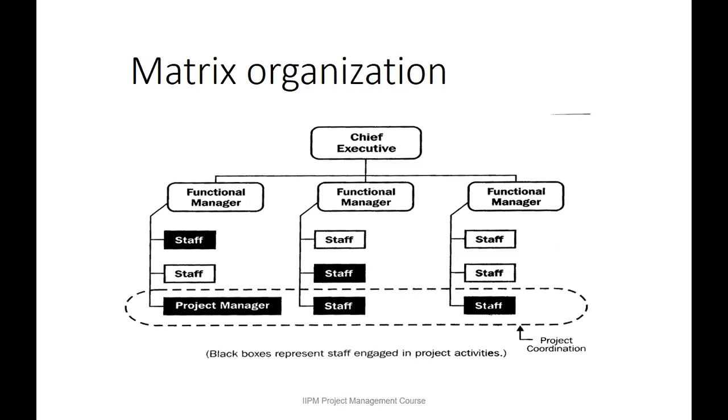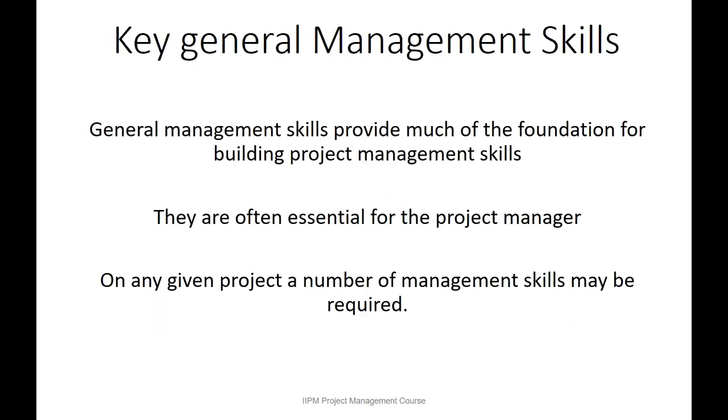So there is a 50-50 balance and check approach. Then you have the other one that we call the directive, where the functional management or the project management office are absolutely responsible for managing the project, and then the authority level of the project manager in that case becomes low. So in that case, we can make it equivalent to the functional structure or functional organization. So we've repeated these things over and over again, and I believe I can proceed from here.